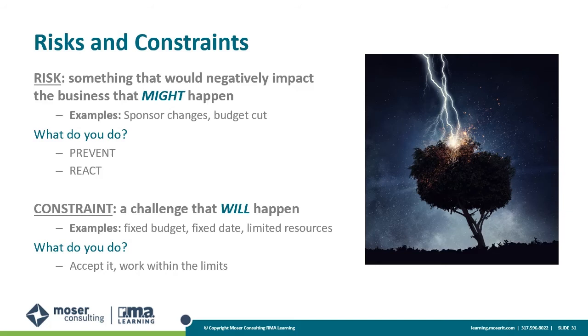So what is a risk in your project? Think of something, you might not be able to get enough staff to work on a project. What is a constraint in your project? Maybe people have to leave by 4 o'clock in the afternoon. That would be a constraint. So a lot of times people think risk and constraints are the same thing, but they're absolutely not. A risk has not happened. A constraint has.